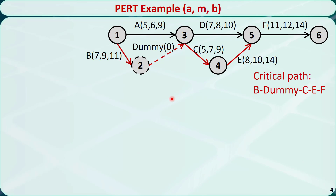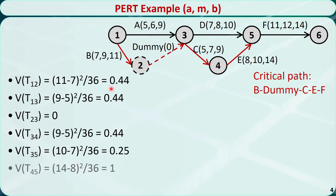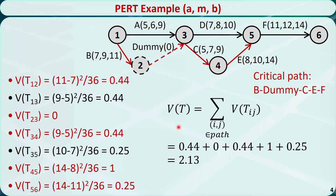Now let's calculate the variance of the duration for activity B: 11 minus 7, squared, divided by 36, which is 0.44. Following the same procedure, we can find the variance values of durations for all other activities. The variance for the dummy activity is always 0. The variance of the duration of the critical path can be calculated by adding up all the variance values of the activities on the critical path. It is equal to 2.13.